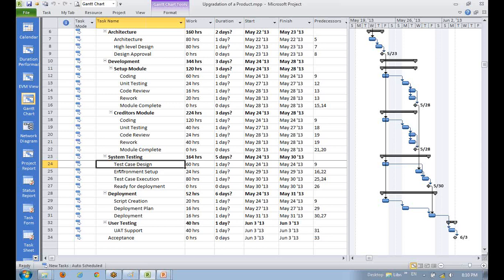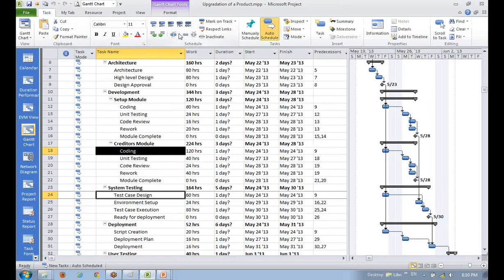Now in this case it's a matter of discretionary dependency, because my resources will be applied on coding first. I want this to happen after coding, so I make it dependent on coding and not on this design approval. I remove this design approval from this.